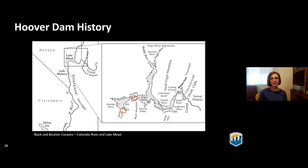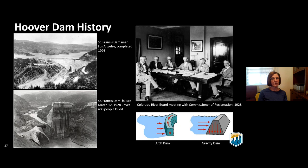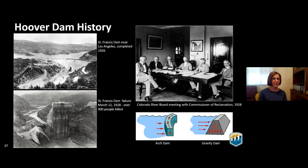The dam design was evolving. In the world of engineering they were moving away from gravity dams to arch dams, which take a lot less material and would lower project costs. Reclamation was in the process of designing an arch dam for Black Canyon. Around the same time, St. Francis Dam just outside of Los Angeles failed and killed over 400 people. Hoover was going to be more than twice as tall as any other dam ever built and would impound more than 700 times as much water as St. Francis, making people very nervous. Reclamation designers immediately started modifying their design to strengthen all redundancies and safeguards. The Secretary of Interior appointed an independent board of engineers and geologists to review all reclamation designs, and they ultimately approved a gravity arch dam — a combination of an arch design and a gravity component.